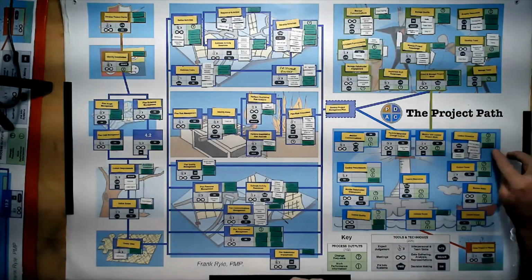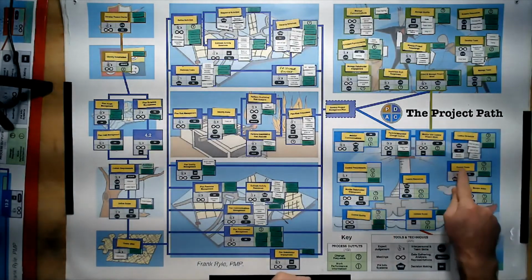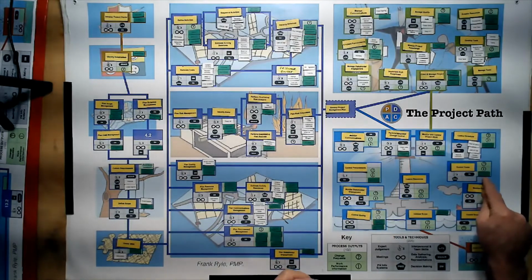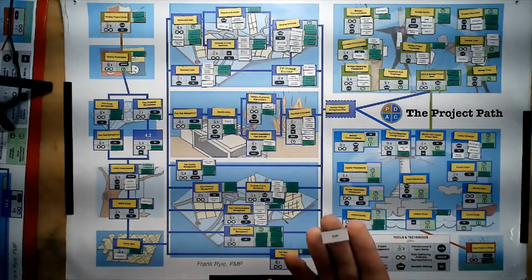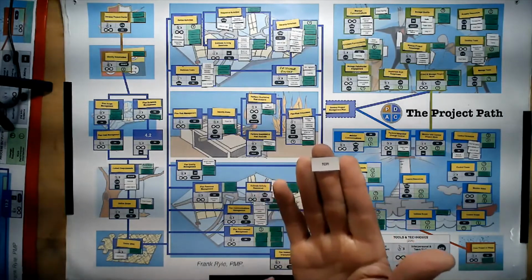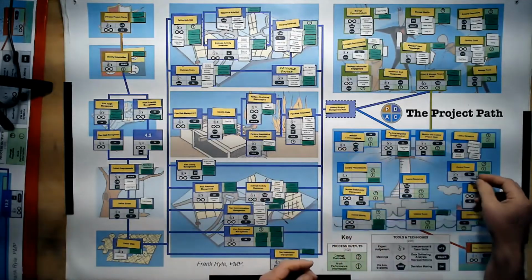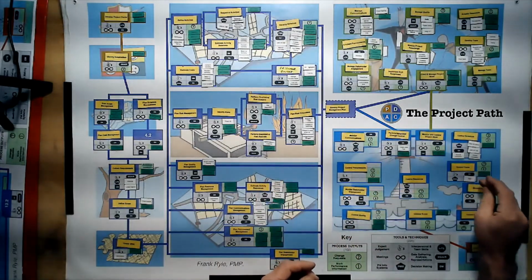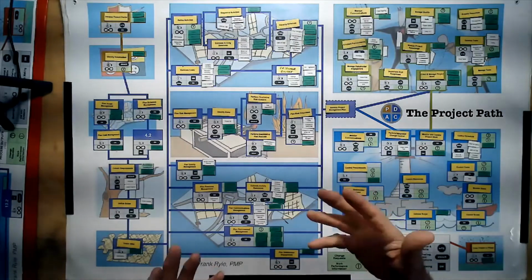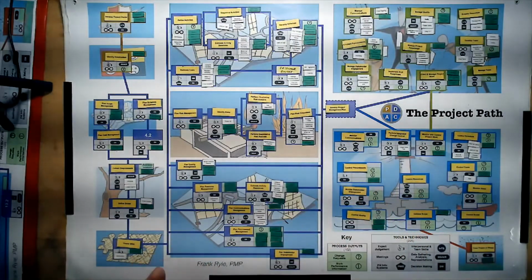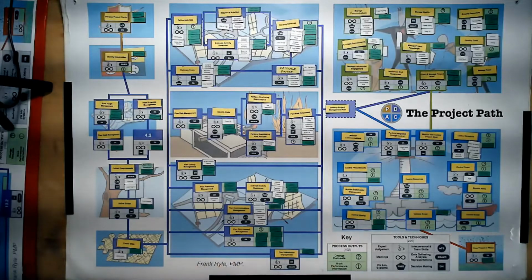Now we're trying to produce what's called a schedule forecast. In this case, with control costs, we're trying to produce a cost forecast. And one of the techniques we might use is called the to-complete performance index, which is a useful technique in earned value management to calculate the rate that we have to go at to end up at the time and budget that we said we would when we set out on the journey.